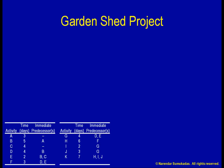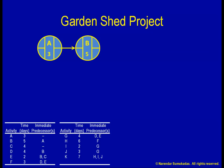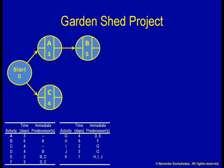To draw the network diagram, we use a series of circles and arrows. We start with Activity A, which has no predecessors. B depends on A. C also has no predecessors. Now A and C form the beginning points for our project. Anytime we have loose ends, they are a potential source for confusion, so it is good practice to tie them down with a start milestone. This zero-activity start can also be thought of as a milestone.